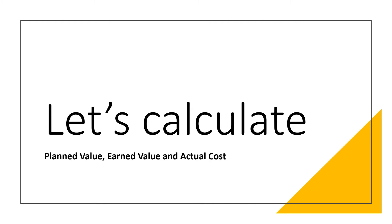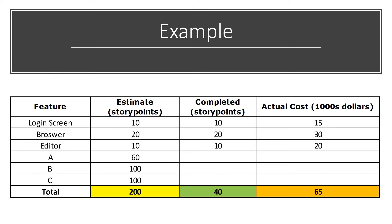The comparison of earned value against planned value lies at the core of EVM. The planned value is the value of the work planned for a certain date — it is the entire budget for the work to be completed at the planned date. In scrum terminology, it is the sum of the estimated feature sizes for all features up until the planned date. The earned value is the value of the work completed at the same date. The earned value is not synonymous with actual cost, nor does the term refer to business value. It refers to the technical performance earned against the baseline or work plan. In scrum terminology, it is the sum of the estimated story points for features up until the calculation date. The actual cost is, as the name implies, the cost in dollars to complete a set of features.